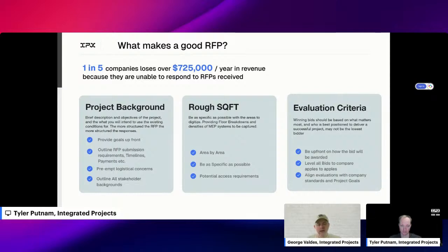And then what you might end up learning later is that actually it's the third floor, but it's only a room. Well, now you were maybe overquoted, right? And so there's another back and forth as to how you're being quoted because we're not being specific enough. So even getting down to what are the rooms and what are the specific things that you want to be digitized from those rooms, that's all very, very critical. And the more you can outline that need up front, the better.